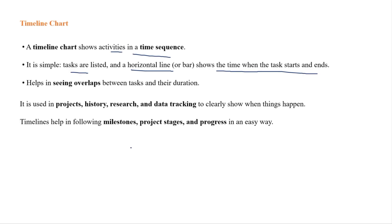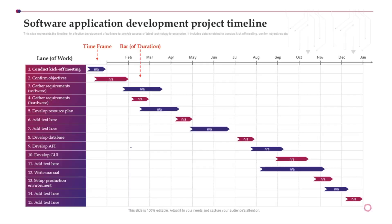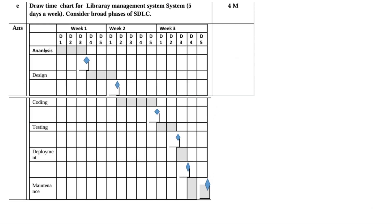The timeline chart shows activities in a time sequence. For example, for a library management system with five days a week, consider the broad phases of the software development lifecycle. First you have to gather the requirement, then design, then code, then test, then deploy, and then maintain.